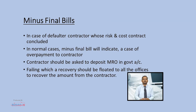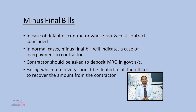The final bill may become minus in case of a defaulter contractor whose risk and cost contract has been concluded, or in normal cases when overpayment has been given to the contractor without keeping in mind the minimum retention at final bill stage. In both cases, the contractor will be asked to deposit an MRO in the government treasury account as recovery to compensate the minus figure. Failing which, a recovery should be floated to all offices to recover the amount from the contractor.